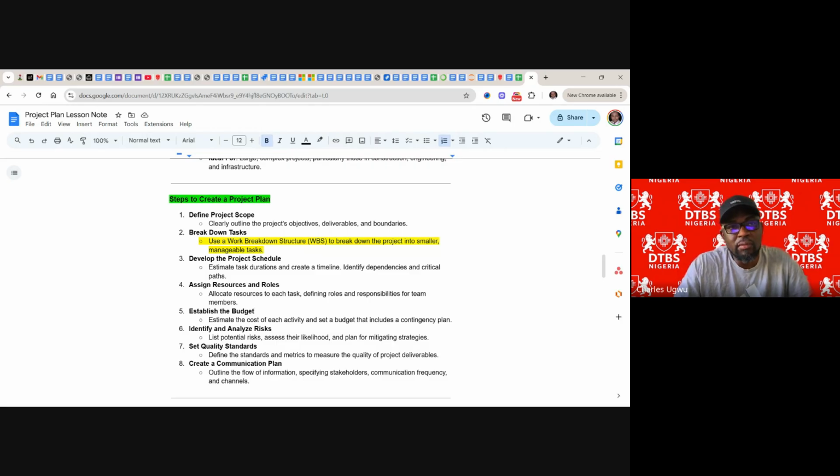But if it's for human resources, you need to state how much per hour you are paying each of them. We are going to see all these things very soon, where we'll be creating it. For a project manager, you state £15 an hour, business analyst £14 an hour, developer, you just put their prices there. And then you start assigning those resources.